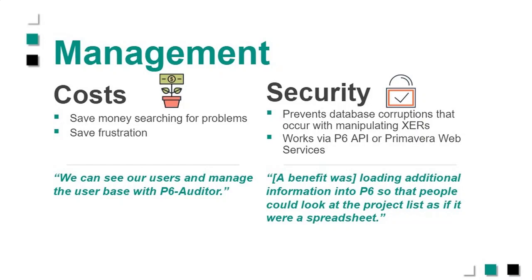Another kind of important note is that our tools do go through the API. So in the case of P6 Loader, if someone is not able to work with global data or security profiles or users, they aren't going to be able to use that function in P6 Loader as well, because it does respect that security that you have set out in P6 for your users. Yeah, good point, Sue. Yeah, really good point.